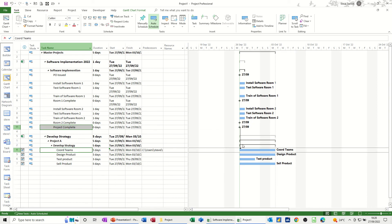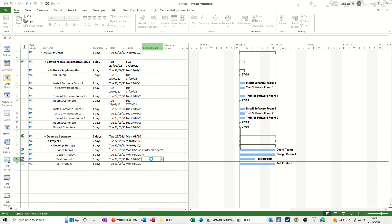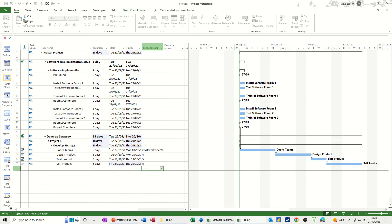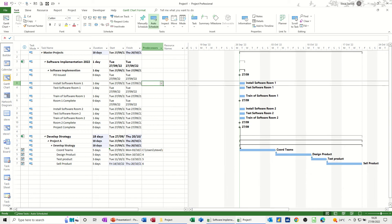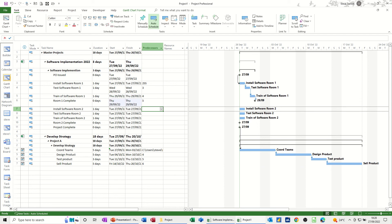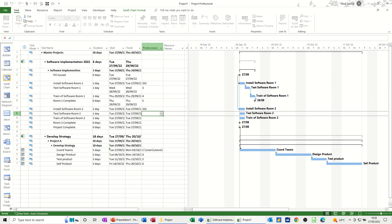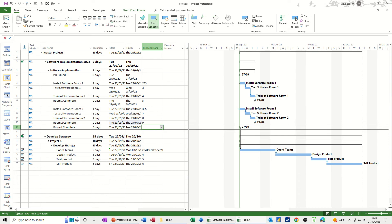Click the link and then it follows on. Now these are not linked so if I just do the links here, so that would be 4, 5 and 6, so then they just follow on. And this is following on that and these are not linked so if I just go, let's go 2SS just get that one going, 3, 4, 5, and then this one's to be 3SS, 3 start to start, 7, 8, 9, and that's going to be linking to 6 and 10, 6 comma 10. So I'll just link all that one up as well.